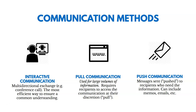Stakeholders access the information when required. We could also use push communications: instead of uploading a report and letting people pull it down, every week we send a message to certain stakeholders about the project's progress — we push it to them. So they can either pull it down or we can push it to them.